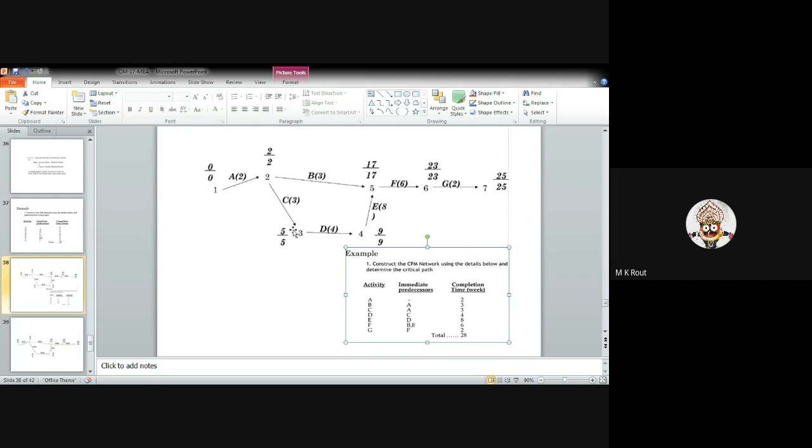In case of the finish of event 3, the next one is from C to D. From C to D, the completion time is given as 4, that is 5 plus 4 is 9. The next event I have written 9 by 9. Moving to the next one, from D to E, 9 plus 8, that is 17. So in case of node 5, I write 17 by 17. Moving to the next one, B to...